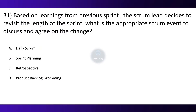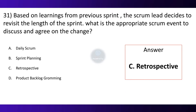Question 31. Based on learning from the previous sprint, the scrum lead decided to revisit the length of the sprint. What is the appropriate scrum event to decide and agree on the change? Option A: Daily Scrum. Option B: Sprint Planning. Option C: Retrospective. Option D: Product Backlog Grooming. The correct option is Retrospective.